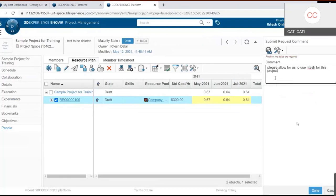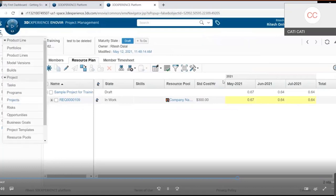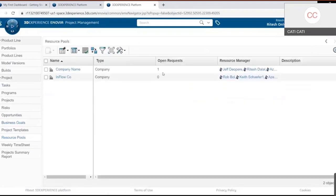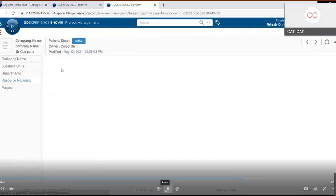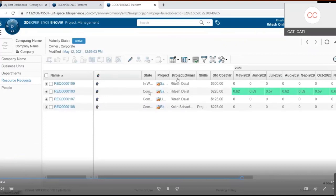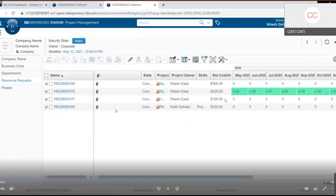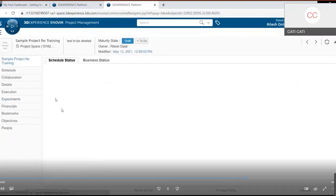Once the resource request is submitted, the project owner goes into Resource Pools on the left. The system shows an open request needing approval under the company name. Clicking on it opens the resource requests — previously fulfilled ones show a 'Completed' state. The new request is approved by clicking the thumbs-up icon. Going back to the project's People tab confirms the resource is now added to the project.